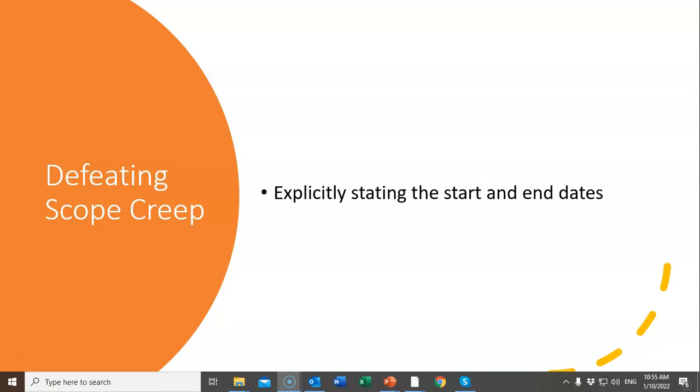If you've had a good working relationship with this client in the past, and you're depending on this client to give you more work in the future, you will have to take that into consideration when it comes to accepting or denying any type of scope creep. So if it comes down to you having work in the future, you may want to consider trying to help the client out as much as possible. Again, this is why we always have that manager with us on site, so they can make those command decisions for us.